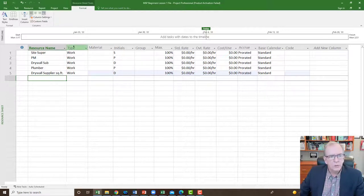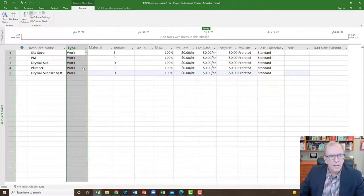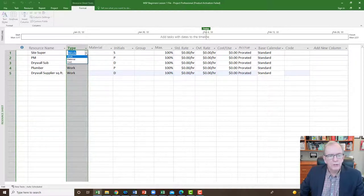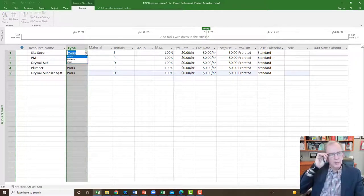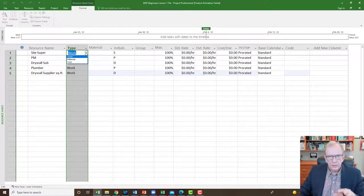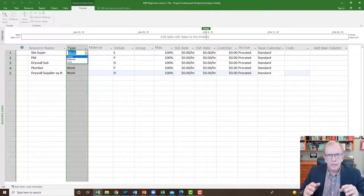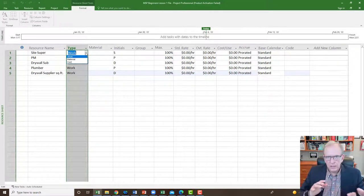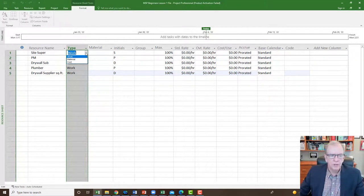You'll notice this column called 'type.' If you click down, you've got three types to choose from in MS Project: work, material, and cost. Those are the three categories — that's all you have to choose from when setting up your resources in MS Project.